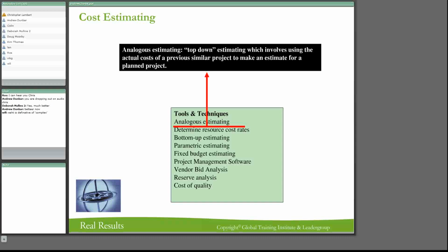You can very quickly take what those costs are, break them down, and fit those costs into the phases and the activities that you've already got on other ones. So that would be a top-down approach. It's not accurate, and project sponsors are probably not going to look at it.